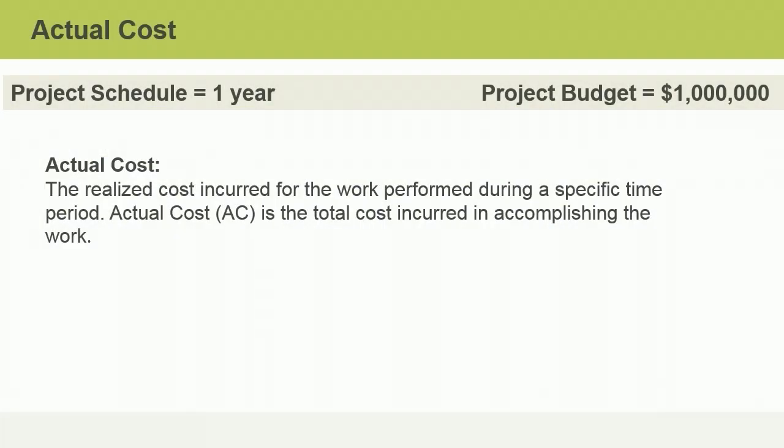When we evaluate our cost performance, one of the key data points is the actual cost of our project to date. The actual cost is a pretty straightforward number that you likely won't have to manually calculate. If you have been using control accounts to monitor expenditures on the level of each activity, you can aggregate these costs to determine what the project has spent to date. You may have project management software that tracks this for you.